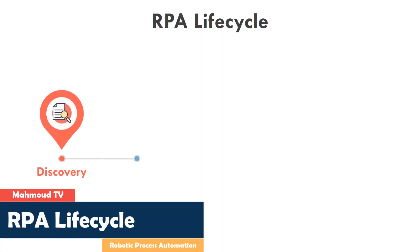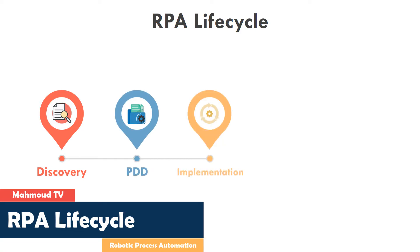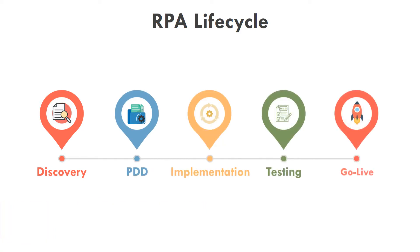Robotic process automation consists of five main phases. These are discovery, create PDD or process design document, implementation of the bot, testing like user acceptance test, and the last one is go live.